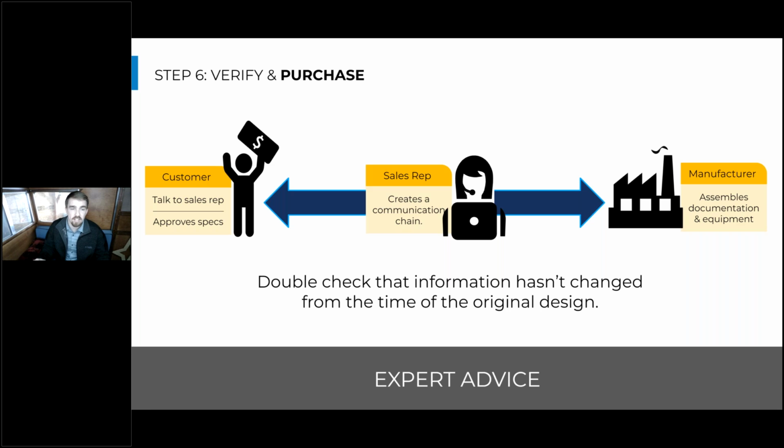But when you're really diving deep into the details of a specific product, it's great to get that rep and the applications engineer from the manufacturer on the phone if it's a product you've never used before. So that's a really powerful way to make sure that you're getting all the details that that specific manufacturer requires, and that all of the information of your project makes it through to that manufacturer so they can fill in anything that isn't totally clearly listed on their documentation in a way that the rep can pull it out and drop it on a purchase order.